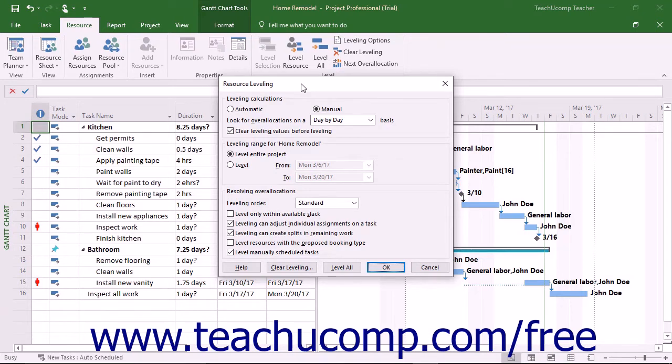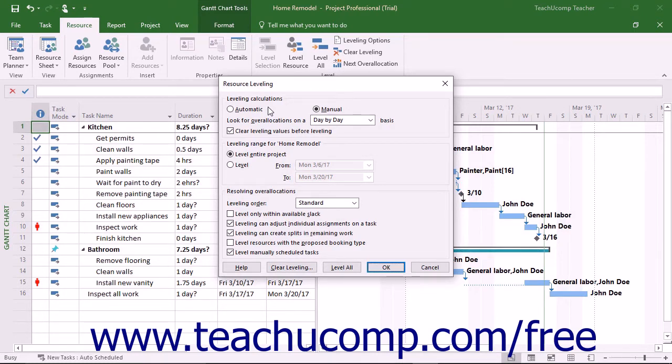For this reason, it is recommended you do not select the Automatic choice in the Resource Leveling dialog box, as that applies resource leveling to all project files whether you want it or not. This can cause more problems than it corrects.